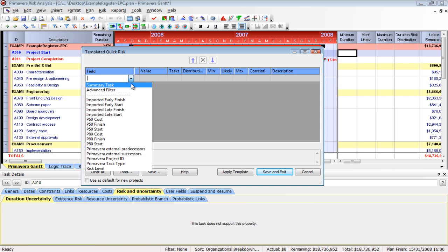That way we can go in and look at our welders, our electrical and instrumentation, whatever the case may be. We track productivity factors and productivity ranges. We can apply that to the schedule based on our previous jobs, and it's a very justifiable answer, and that can be applied to our base schedule. The other thing, it doesn't have to be necessarily something percentage based. If I can make a grouping and say, well, we've got a set of concrete activities for the next 30 days, everything's going to end up being percentages, but we might take the durations and convert them to percentages.